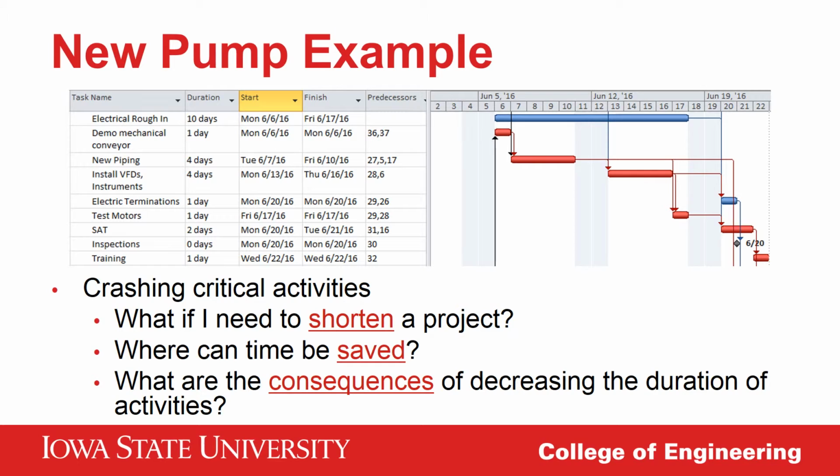At this point, I've started production 4 days early and increased my costs around $20,000 for the weekend work. This increased cost is still less than the profit I expect to earn, so I can keep cutting. I then looked at extending working hours from the contracted 1 10-hour shift each day to 2 12-hour shifts, working around the clock, shortening the remaining downtime even further.